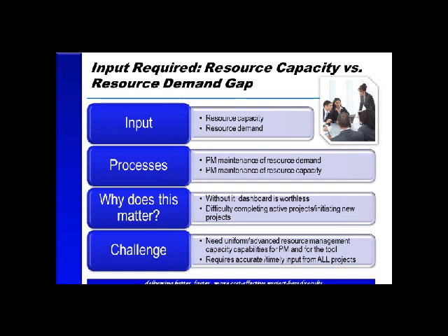That puts kind of a high watermark on, if somebody's only available 50% of the time, we could make their max units 0.5. The other way we can do that is we can show them only available between 8 a.m. and noon on Monday through Friday. But at the end of the day, the idea is there's some level of input required, some level of accuracy required. If we want to be able to state capacity accurately, that implies a couple of things. It implies, for example, a complete inventory of the resources that would be involved.